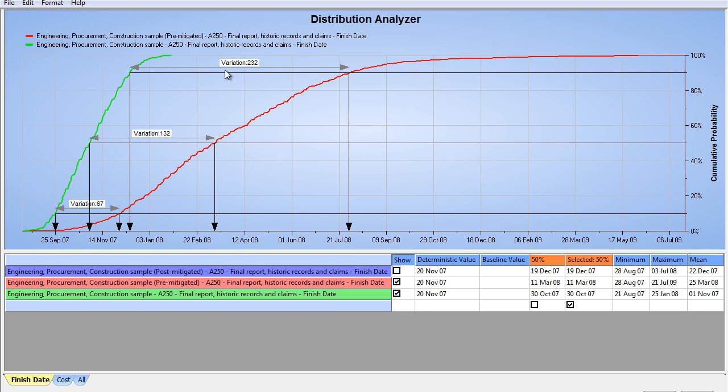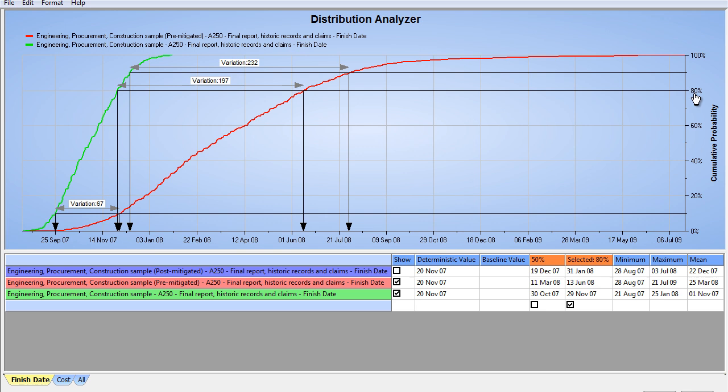Now, based on any project, this could be different. Maybe my uncertainty cost me 20 days, my risk register cost me 30 days. But by seeing these curves too, I can start to comprehend how much savings I could have. So I look at this and I say the risk register alone at an 80% or a 90% confidence level, we'll look at 80%. That's 197 days. So I need to save 206. 197 I can save right in that risk register.